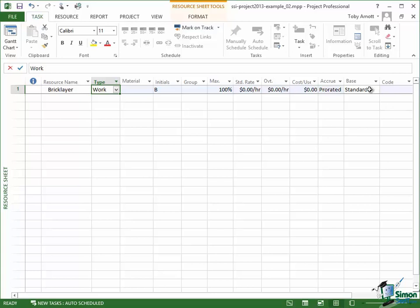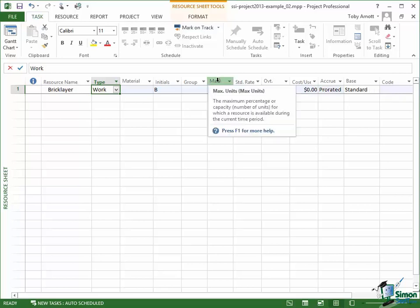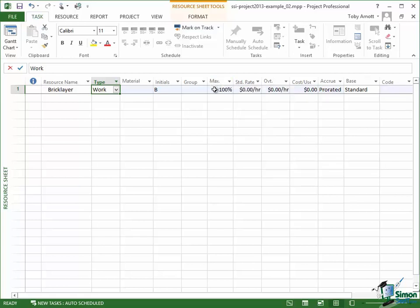But a couple of these fields are important. One of the ones that's important is Max and the Max field says what's the maximum number of this thing that we have available. Now we'll talk about maximum amounts and availability and so on later on as well.